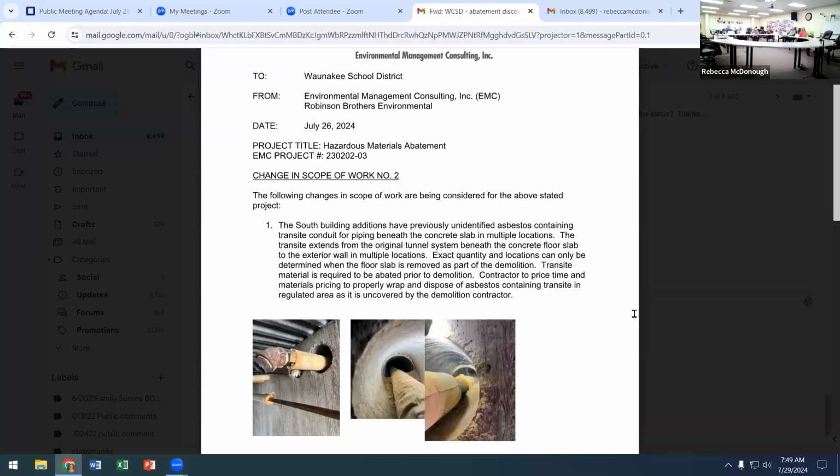An example of that at Heritage was the principal requested a black fence in the far southeast corner of the property to protect it from kids possibly running into the neighboring farm. That was our request to put that fence up, so we used owner contingency.